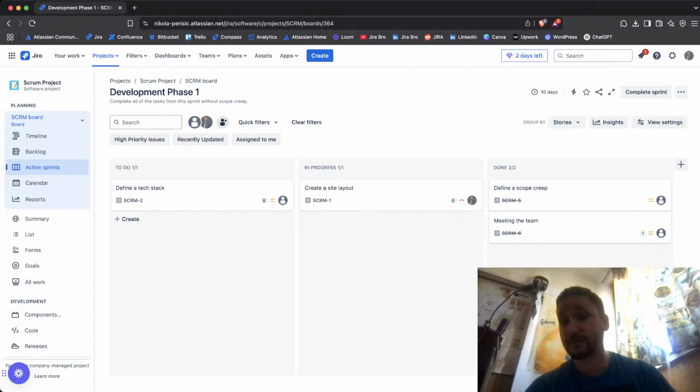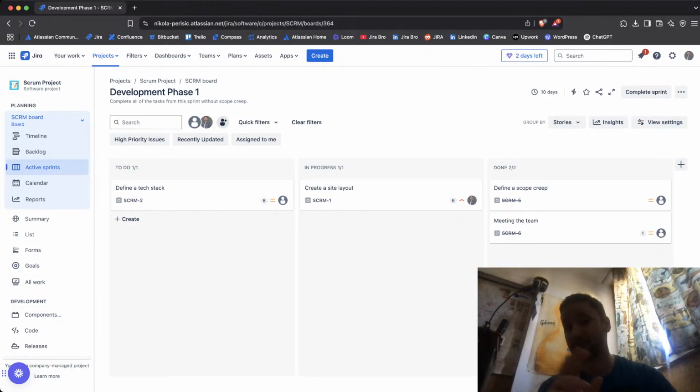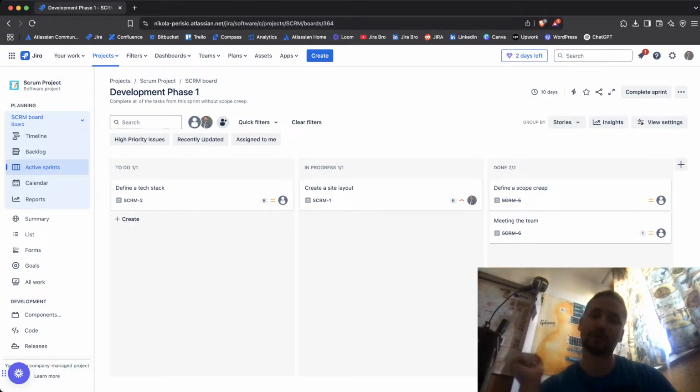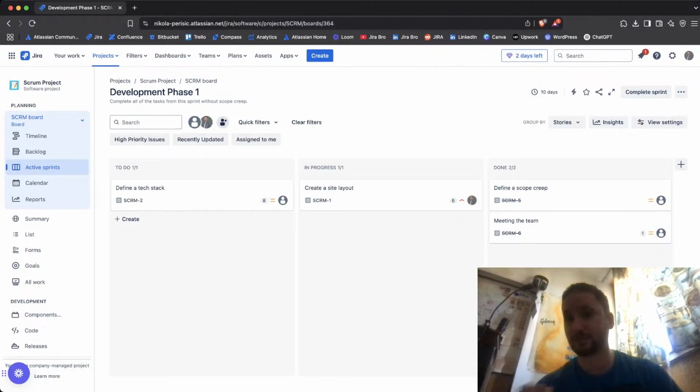When you do this, a stopwatch is being started, and your board with the issues is actually being shown. Why is the stopwatch being started? Because Scrum Master needs to be there, and when something is over 15 minutes, they need to be like, okay guys, let's maybe discuss this through Slack more, and let's get this done, let's go back to work.